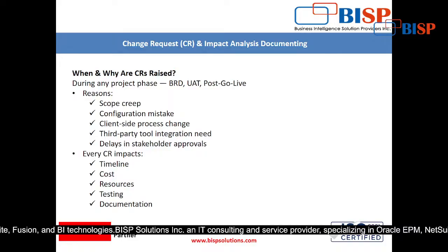So that is why the best policy is to first spend 1 month extra on information gathering, so it will save you much time and effort. If you spend 2 months in information gathering, it will save 5 to 6 months of delay in future, right? So the correct practice is always to spend sufficient time on information gathering and then analysis.